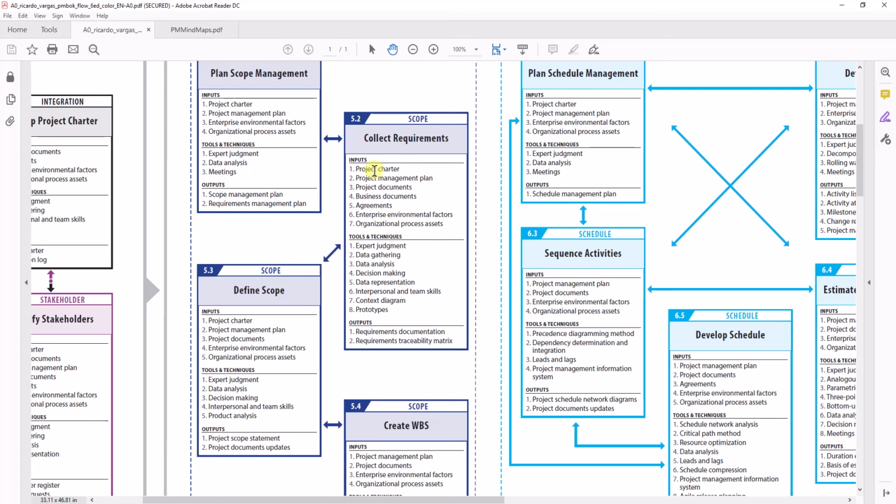Then there can be consensus, where everyone agrees. So it is unanimous, for example, everyone agrees to that. Sometimes there could be a majority, which means 50% plus 1. Sometimes there could be a plurality. Imagine there are 100 people, they vote, and they vote 40, 30, 30. No one choice got 50%, but 40% is the highest. So this is called a plurality. These are PMP exam questions. So these are the different kinds of decision making.